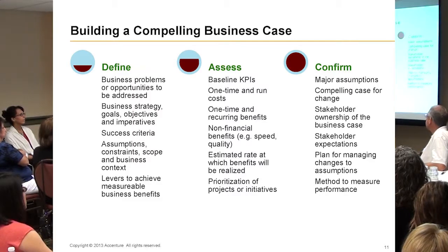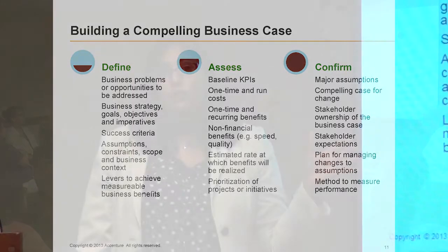That's great. The important point, though, is to keep that business case a living document, so that once it actually gets approval, hopefully, and you move to implementation, that business case is where you anchor back to make sure that you're actually hitting what you had envisioned in terms of recurring costs, recurring benefits, et cetera. And one of the things I like to recommend when I do business cases at the front end of a project is that you build into that business case, and we'll talk about this later, what I call value events. And that's like a trigger, if you think about it as a trigger.